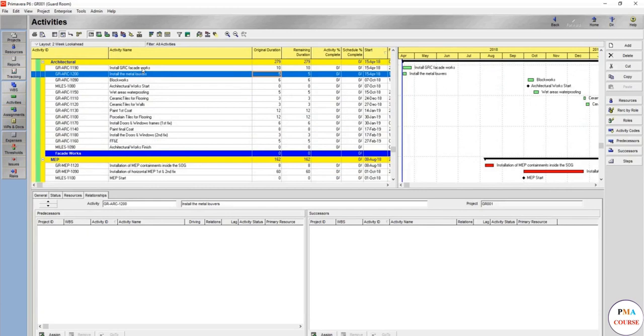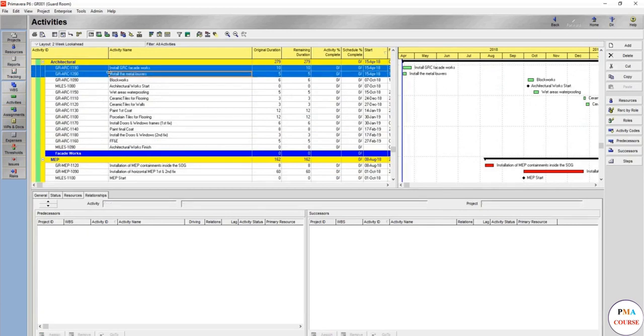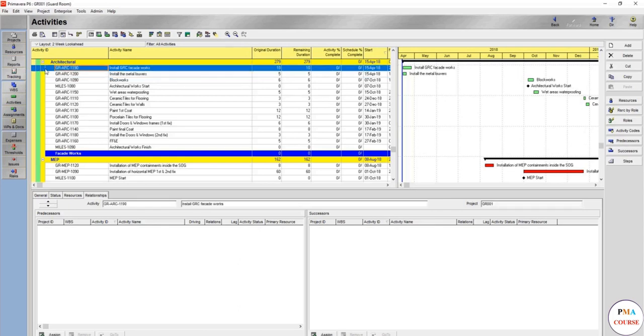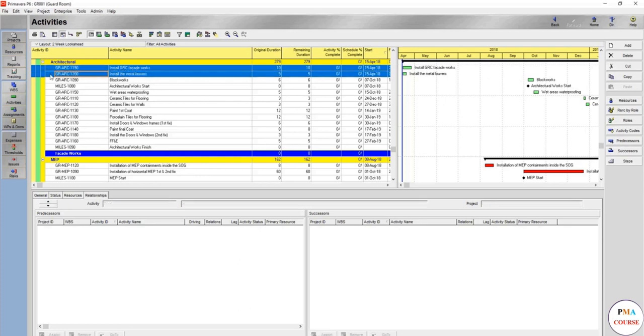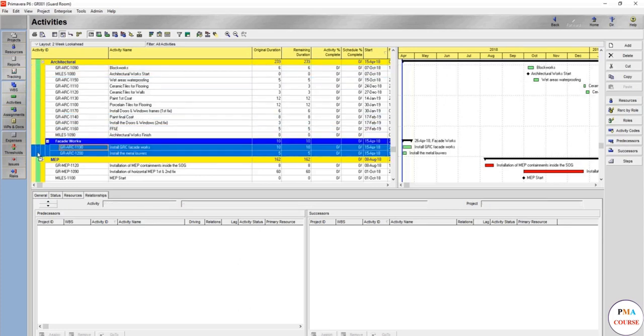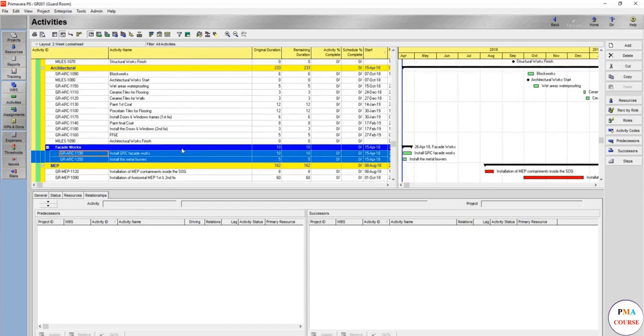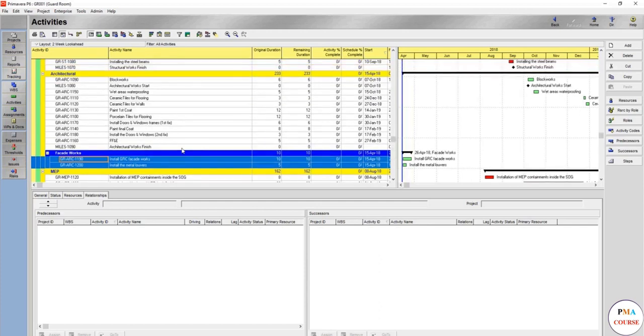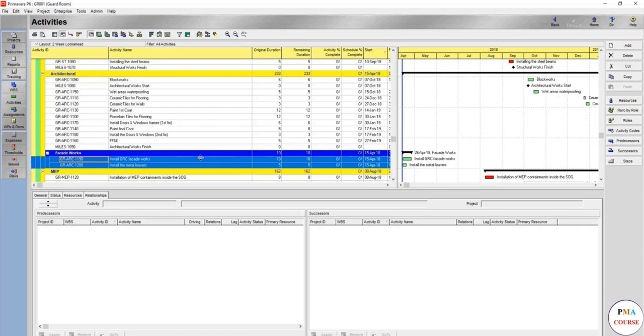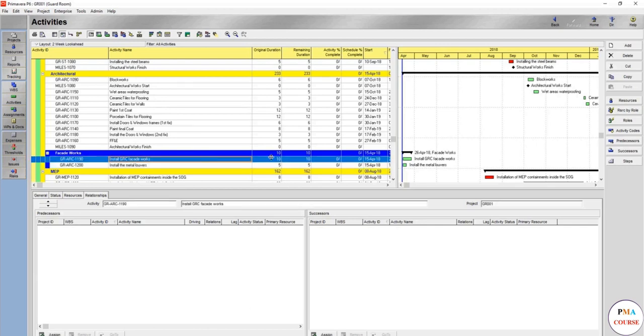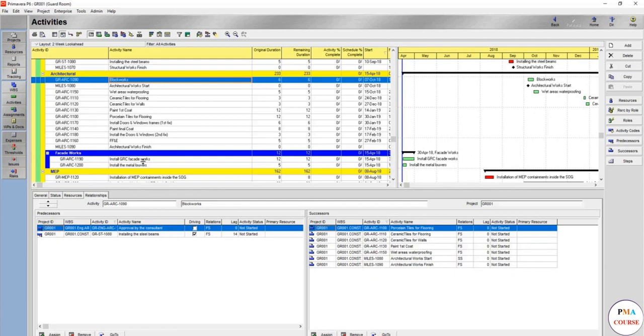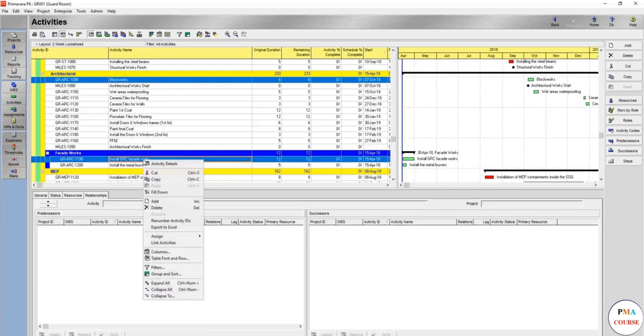Move these two activities. You can cut and paste or just come here till the arrow changes, pick two, and here it comes. Go to the facade. How are you going to link it? Actually, you can start it directly after the block works in the exterior because it's exterior work while you complete your interior works, but there is some waterproofing or primer required before installing this GRC especially. Let's relate this with finish to start.